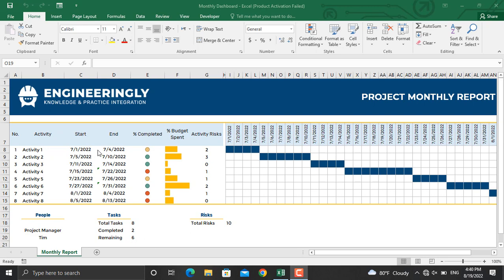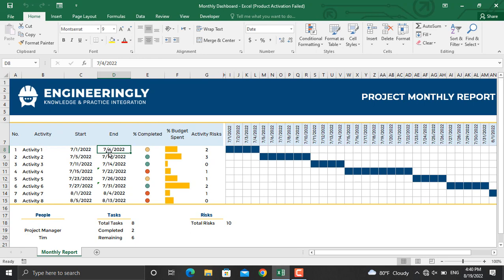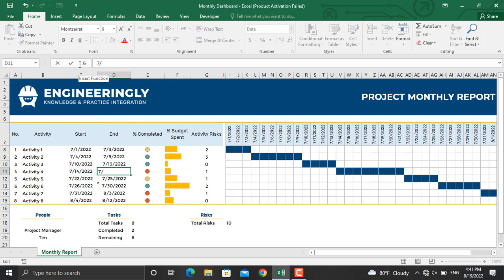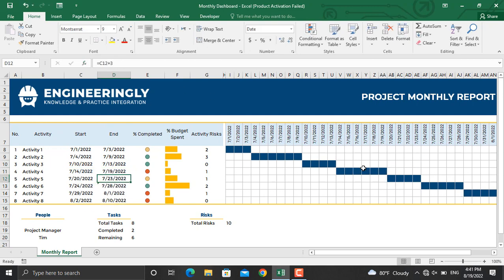If you make any updates to the start and end date, the percentage completed, and the percentage budget spent, they will be represented dynamically in this report. For example, let's assume the end date for activity number one will be July 3rd, 2022 — I'll write down 7/3/2022. As you can see, the Gantt chart will be updated. Let's also make another one July 19th, 2022, writing 7/19/2022 in the function bar — the Gantt chart will be updated again.